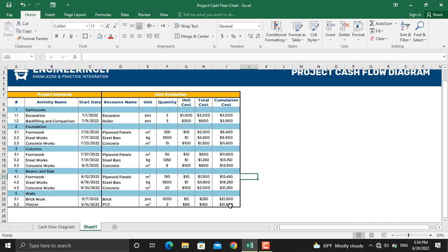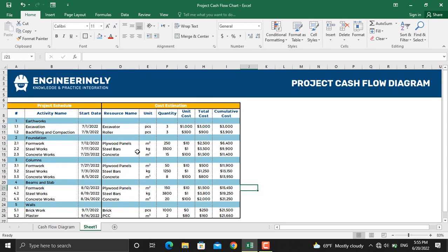Once we have calculated our cumulative cost, you will have the total cost for the project. Besides that, we will have the cumulative cost over the life cycle of the project. Now the last thing in here is to plot the cash flow diagram. For that one we will need the total cost for each date and the cumulative cost for each date.